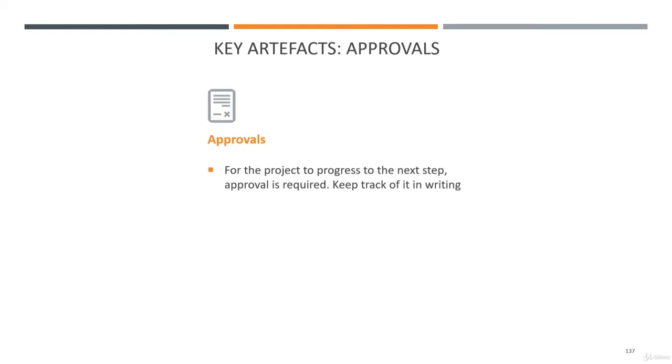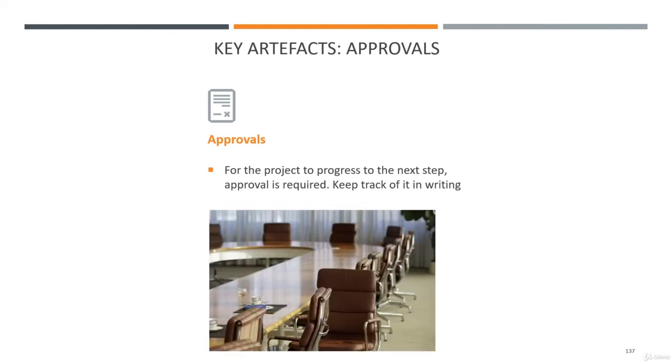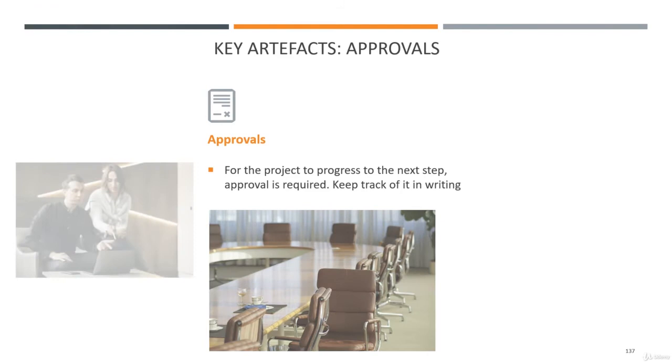So if, during the meeting, you ask, are we okay to implement this on Saturday? And someone says, yeah, fine. Either you ask them to send you an email, which they might not do, or else you put that in the minutes, and then you use that as a formal approval. Sometimes, implementation seems very obvious, but sometimes it's a decision that is being made during the meeting, so an approval to do something differently. And I would do that in the minutes of the meeting as well. It's easier.